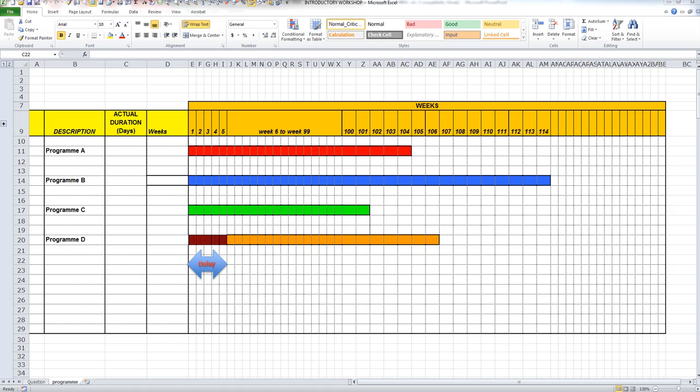So now let's look at the solution. Now, since the contractor has agreed to a program, he cannot go back and try to go for an accelerated program unless the contract that he has signed allows him to do so. Now, this is highly unlikely. And since the contractor's program showed a completion in 101 weeks, there was 13 weeks of float which could be absorbed before any critical delays occurred to the project completion date. Therefore, there would be no extension of time for this 5-week delay.